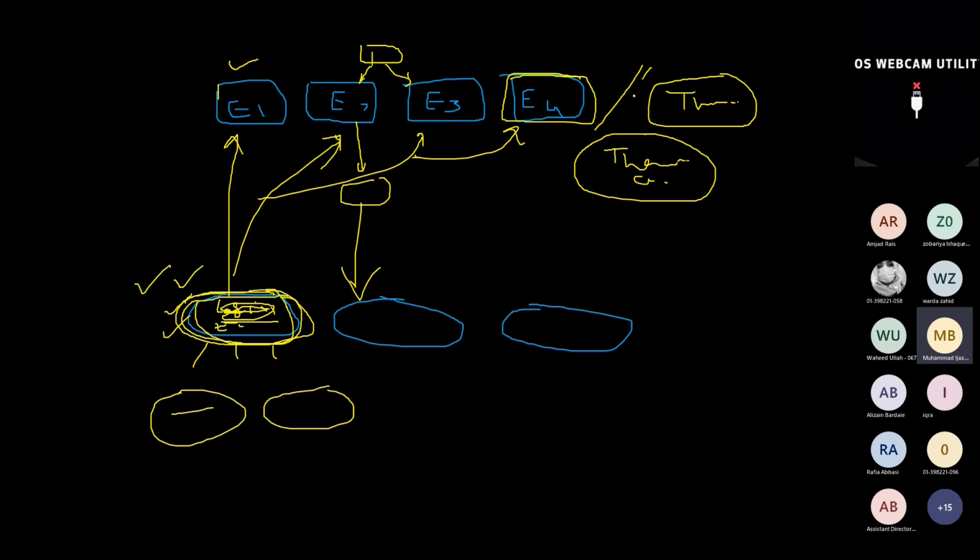However, some say that epics and themes are at the same level. Epics have their clear-cut user stories or features under them, but the features or user stories that are common among multiple epics are called themes. They combine them together as themes. Is it clear? I know this is confusing.